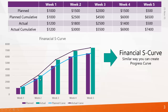The violet color shows the planned and the green color shows the actuals. Here you can see the cumulative of planned and actual graph going up. When you draw a line based on planned and actual you will get two curves. The violet curve represents the actual which is displayed over the planned curve, meaning you are spending more money than planned. The sky blue curve represents the planned, which is below the actual.